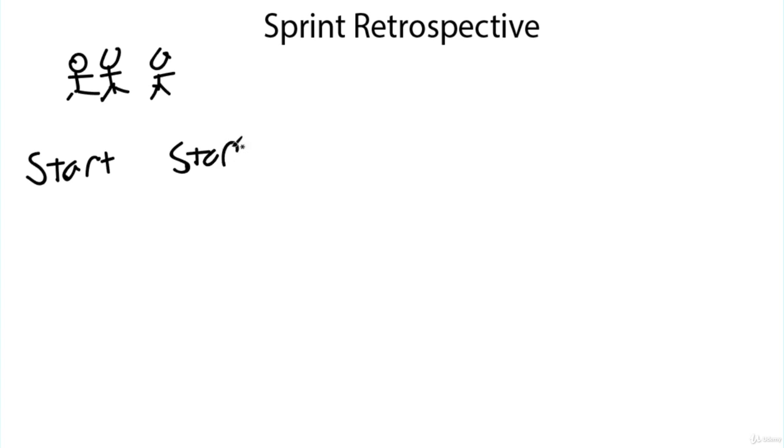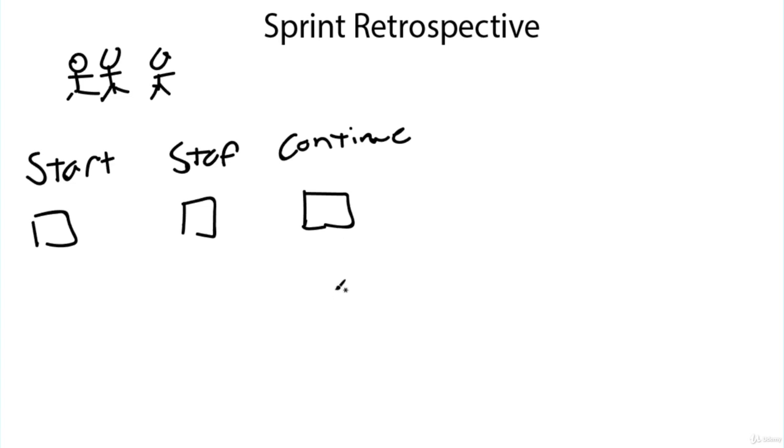So you have all of your people coming together, and they are all going to be talking about, in a critical way, how do we make ourselves better? Now, with this, there are lots of different ways to create things that work. A popular method is a start, stop, continue. And this is a really simple exercise where people just go up and they put things that they want started, things that they want stopped, and things that they like and that we should keep going with.